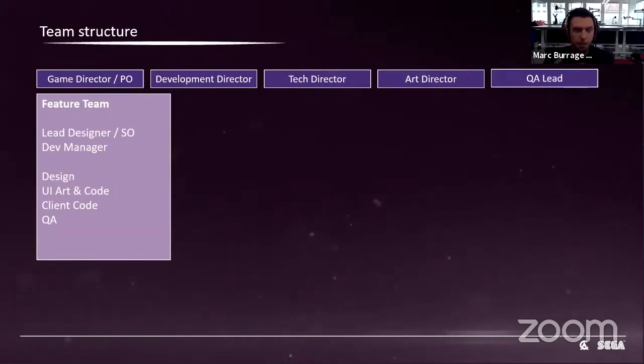Unlike a lot of game teams who will do QA towards the end as a separate thing, we wanted to make sure that our definition of done for each of the things we were working on was always tested. And then the only QA that needed to happen at the end of that was integration when you're putting it into the rest of the game. So we had the feature teams who'd be handling new features, development of features, things like daily missions or a new battle type.